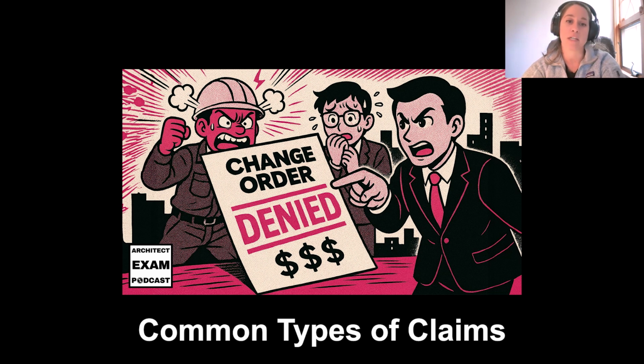There are a lot of administrative costs involved with document management, staff time for claim preparation, and technology costs for e-discovery, sharing all of the discovery of the claim or dispute that's being shared. All of that needs to be shared amongst parties. And then there's the actual payment or the settlement of the judgment that is made of this claim, which can typically be 5 to 15% of the total contract value.